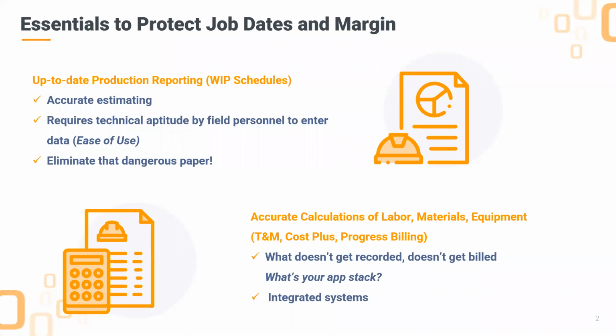And then finally, the construction industry is notorious for this, but if we've got paper change orders and purchase orders, documents rolling around the field, this is going to be a problem. We don't know what we don't see. So, many, many market research firms, McKinsey, Gartner, they've been out there and for 20 years, they've been telling us that it costs about 12 to 18 bucks per piece of paper to handle paper manually.